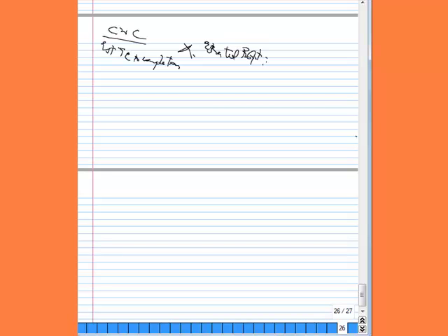That's the profit to recognize in the account for that period. Or the value of work certified over total contract price, times estimated total profit.